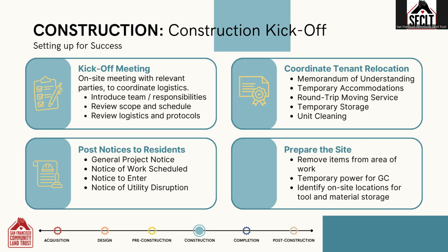Based on feedback from the kickoff meeting, there may be areas of the site that need to be prepared in advance. For example, there may be items that need to be temporarily relocated in front or in the area of work, trash that may need to be hauled off, or temporary power that needs to be arranged for the contractor.